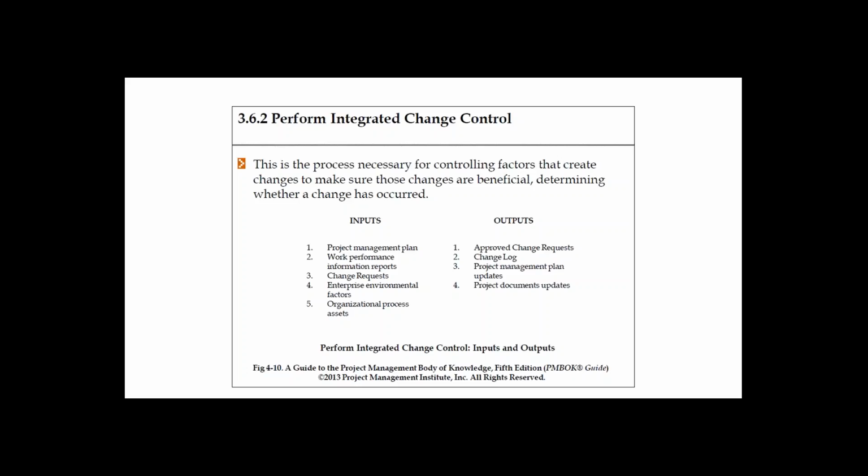So I was just telling that in a big organization like Amex, you have a huge change management process in place. It is very difficult to implement changes in production. For example, if you want to install some changes in a test environment, you need to give 2 days of heads up. You need to get approval from your immediate FT lead and your manager. There are at least 3 levels of approvals just to install a change in the test environment, and assume how the change control process would be when we have to implement the change in production.